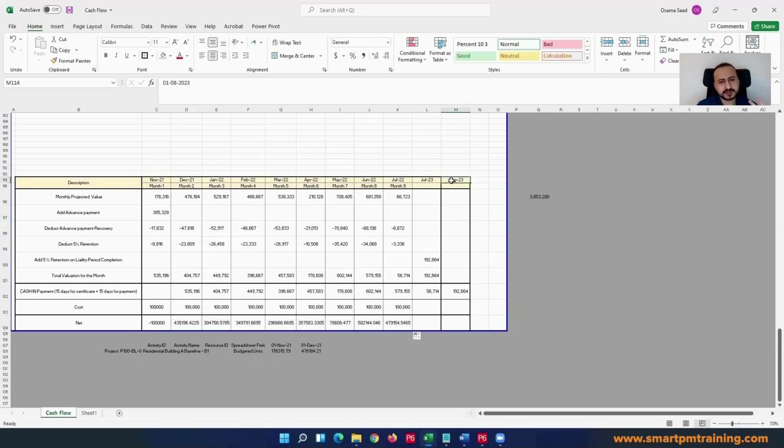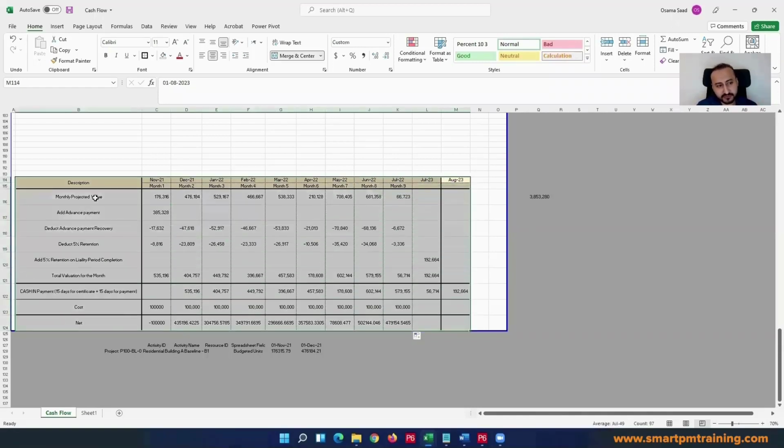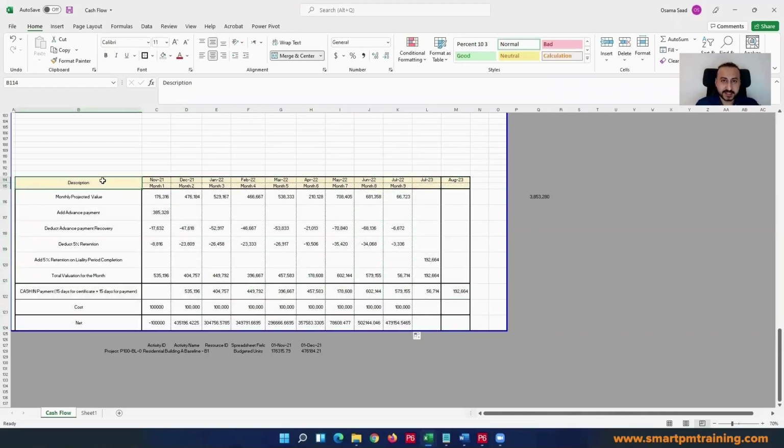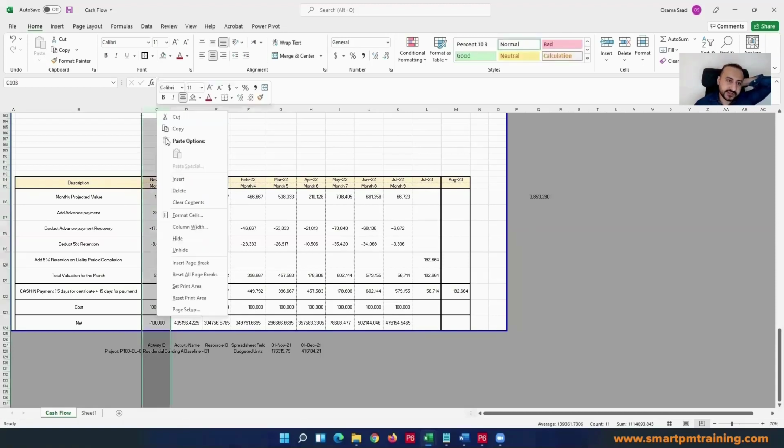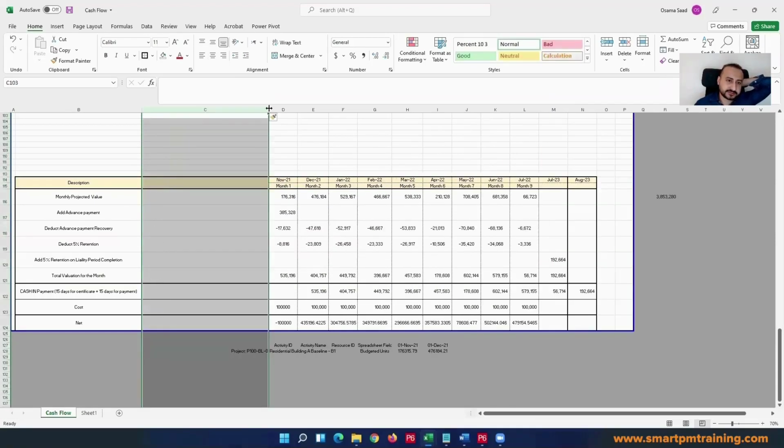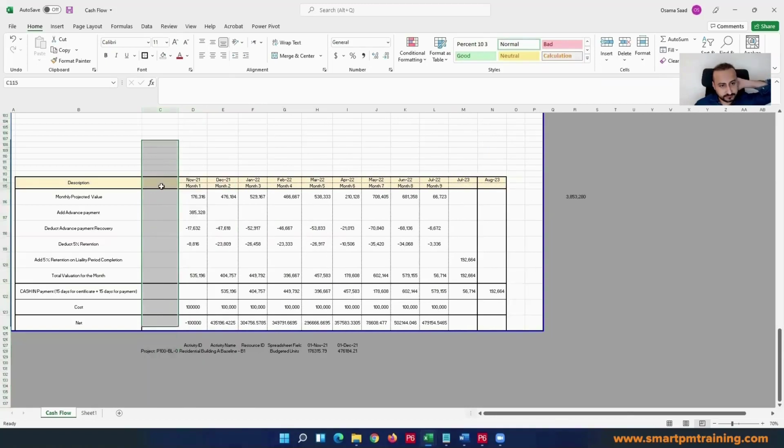Because typically you say, but companies have money, yes, they have money, but typically companies have a separate bank account for each project for the ins and outs. So right now they may have transferred some money temporarily, but they want to get the advance payment as soon as possible so they can manage the cash flow. So not really negative here, because I would say the advance payment is received before the project start. So you can see here start, and they take the value here.